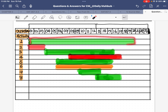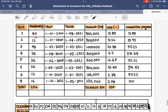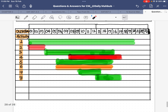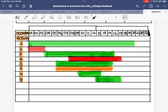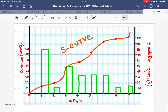For the second activity with 12 weeks: 12 divided by 4 equals 3 months. The starting date is 1st January, so from there it runs for 3 months. In the same way I can draw the full Gantt chart diagram for all activities.